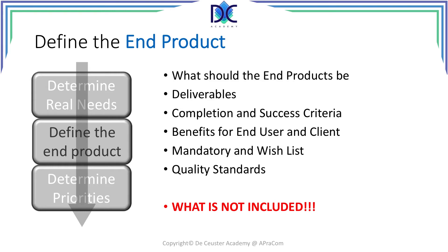Very important is the mandatory list — what are the features that have to be there — and what is the wish list, what would be nice to have. If we have time and money, we could add those elements from the wish list to the project. We have to identify the quality standards and any regulations or other documents that relate to the construction of the end product. And the last very important part is to clearly define what is not included. In many cases people forget to add what is not included. When you don't clearly specify this, people may make assumptions that some items are part of the project.